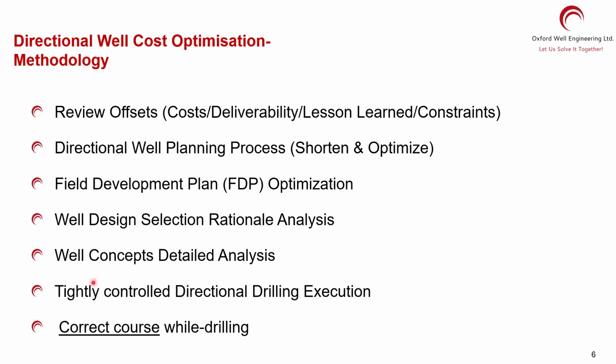It's real-time monitoring, real-time directional improvement and corrections that you need to do. Everything is driven by the data. If you are going off from the plan, the system should be able to tell you. That's easy. There's no excuse for not doing this control, because the data can actually tell you straight away, and show the room for improvement.